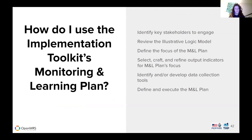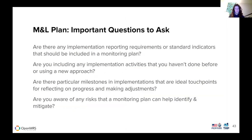The toolkit itself has a monitoring and learning plan you can use to identify stakeholders and review the logic model. Important questions to ask for the monitoring and learning plan include: Are there implementation reporting requirements or standard indicators that should be included — often from funders, the ministry, or other stakeholders? Are you including any implementation activities you haven't done before, or using a new approach? Are there particular milestones that are ideal touch points for reflecting on progress and making adjustments? Are you aware of any risks that a monitoring plan can help identify and mitigate?